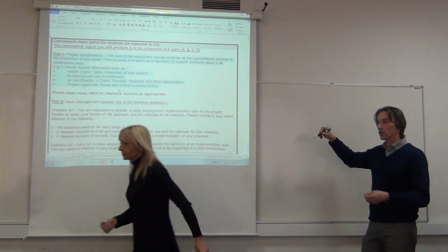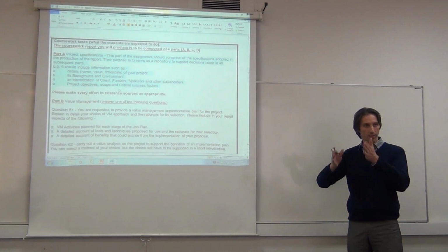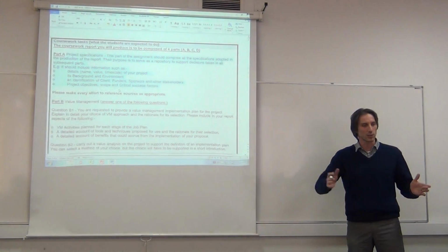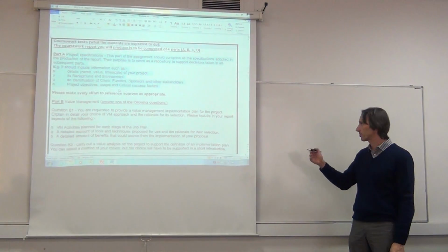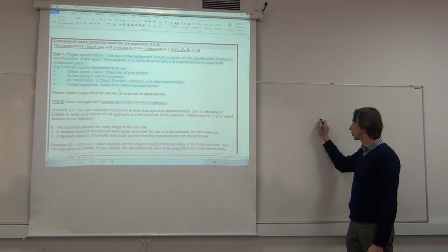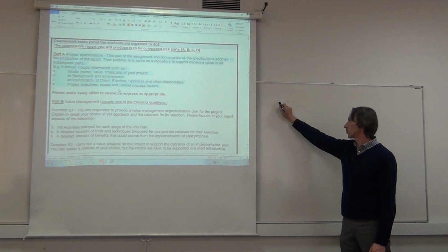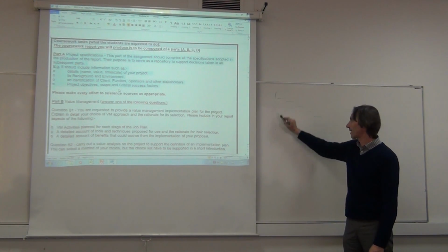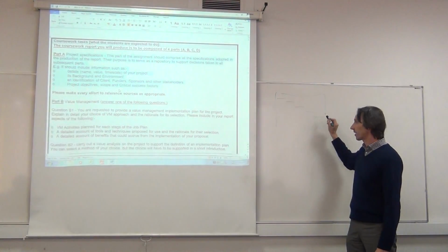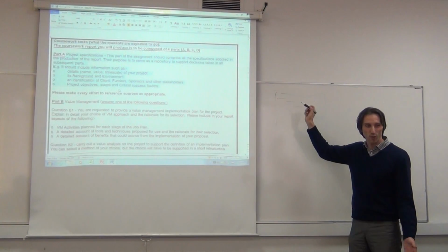So the governance of construction and infrastructure is very much mandated. The information that you have at the beginning of the project is very likely to stay the same for the whole duration of the project. So typically you will go and do a very long waterfall system. Between this point and this point, it's a 10-year process, right? And you can still rely that after 10 years, cars will have 4 wheels, right?